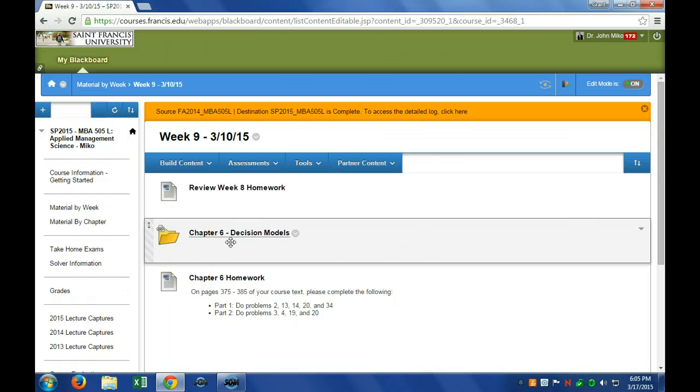The way this works, it's called the 3-time estimate approach, and it's also used for costing. To get the average, and we don't have to do this by hand, what we do is we take the best case scenario, which is usually A, plus 4 times the most likely case scenario, plus the worst case scenario, and divide by 6.